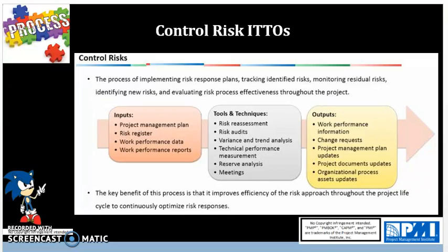For tools, we have risk assessments. This is where we are going to reassess current risks and close risks by approaching the risk and its impact on the project. If the risk did not impact the project, then we update the documents and determine if there is still a danger of the risk occurring.